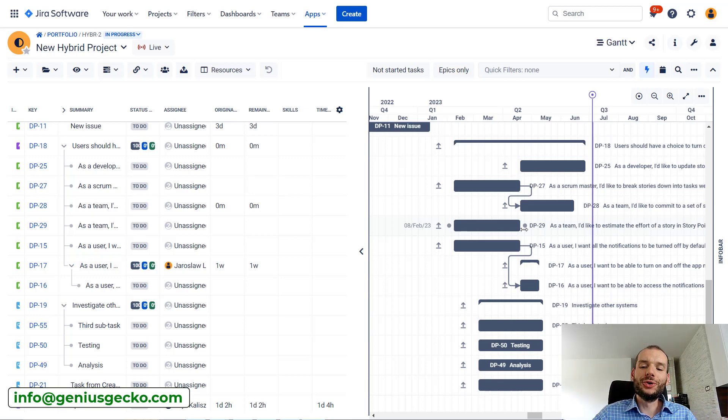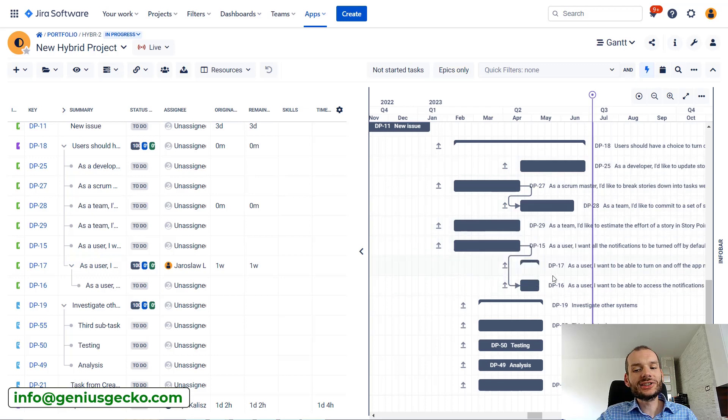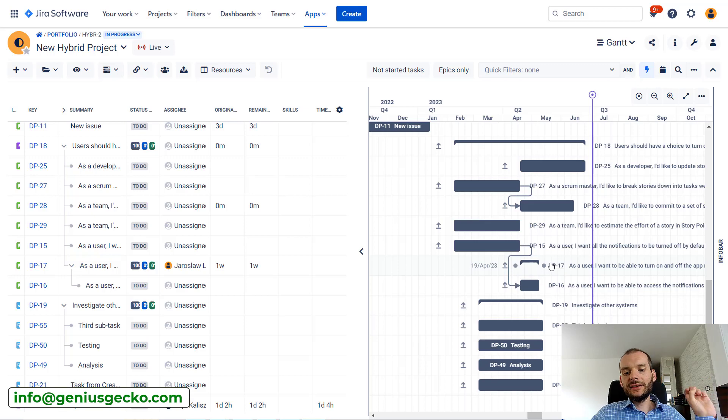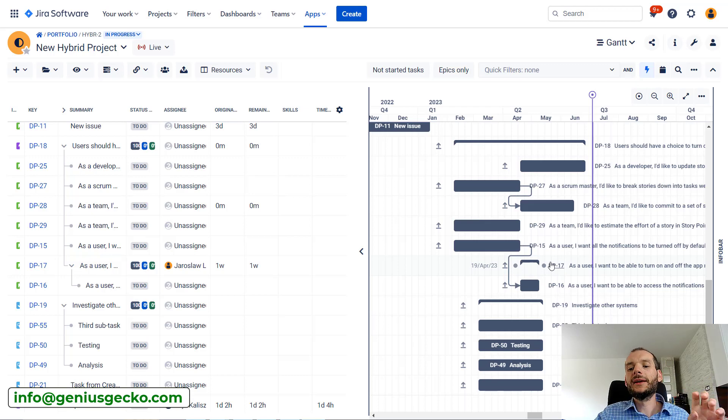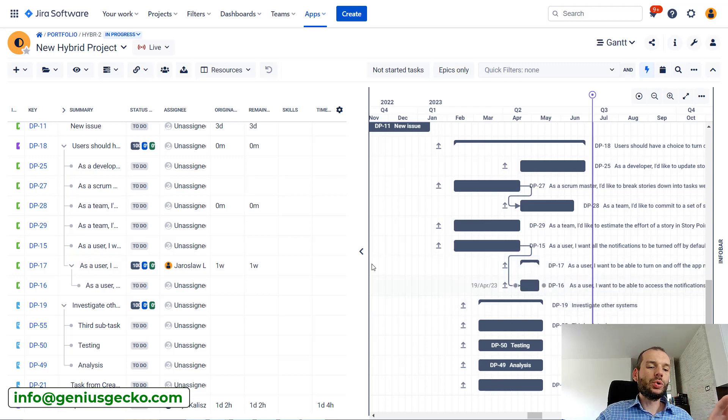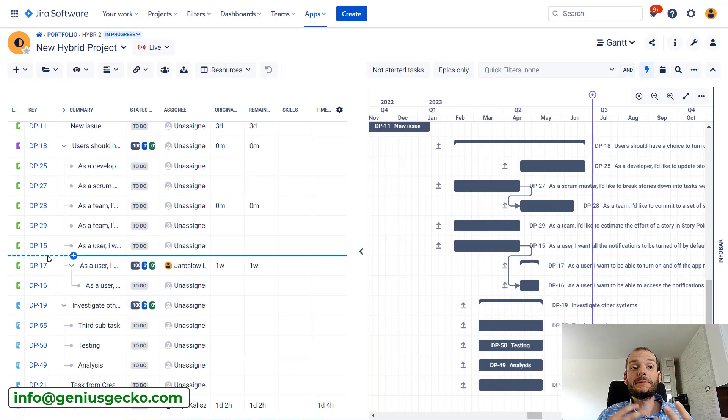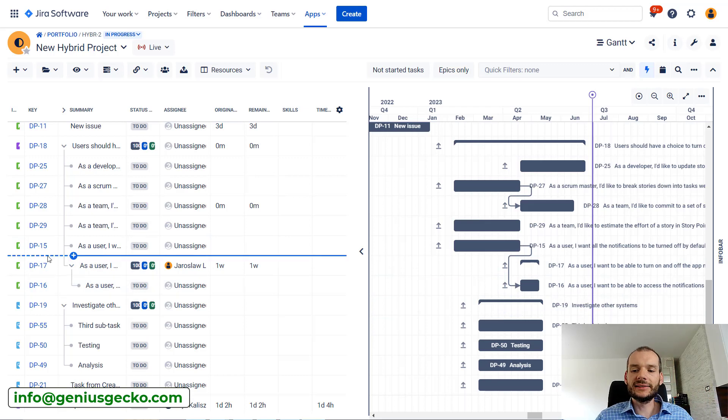What's more, usually if you start changing it over here in Big Picture, it automatically updates issues in JIRA. So people who are working on this task might be confused why suddenly my end date changed or why there is a new dependency over here.